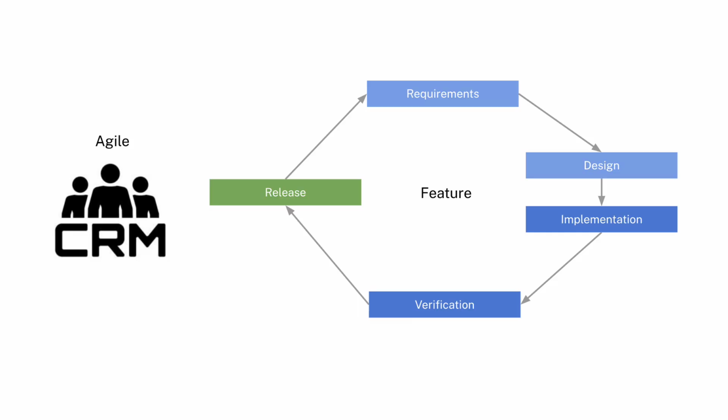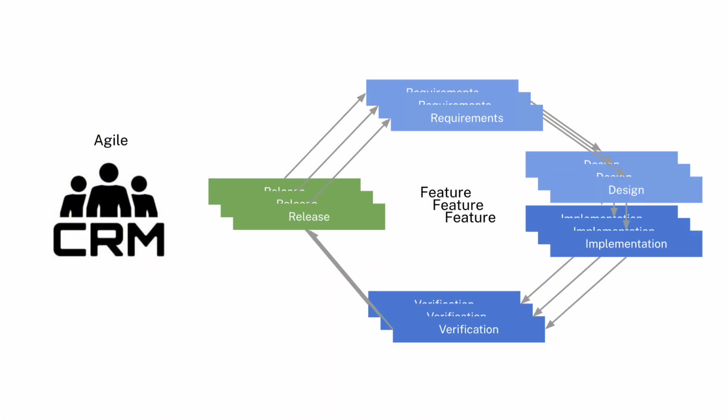While Agile approach allows us to get the requirements about one feature, design all required components for this feature, start implementation, finally test and complete the feature and release it. Moreover, while the feature 1 is already in development, we already get the requirements for feature 2, then do design, pass into development, and move on. Then we can switch to get the requirements about feature 3 and so on.